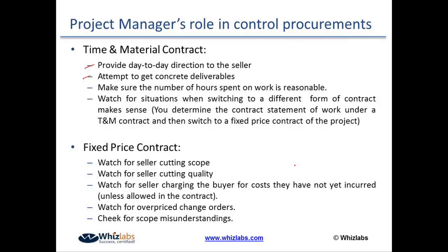Like the example I gave you, my server is crashing again and again. I want IBM to fix the issue permanently. That cannot be a cost reimbursable project, because IBM would tell me that I need to check and go for a few tests to find out what the actual problem is. So I cannot guarantee how much time it's going to take. Accordingly, I cannot guarantee what the total cost would be. So I cannot go for cost reimbursable or fixed price. In case you know the solution, tell me, I would implement it. Otherwise, go for time and material.